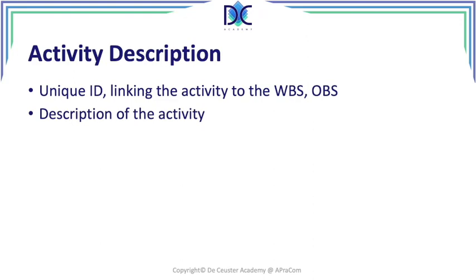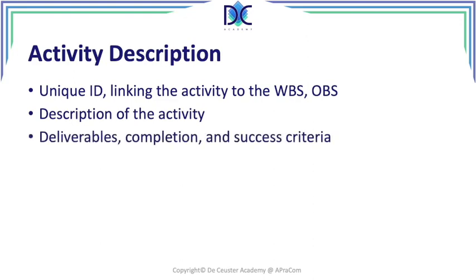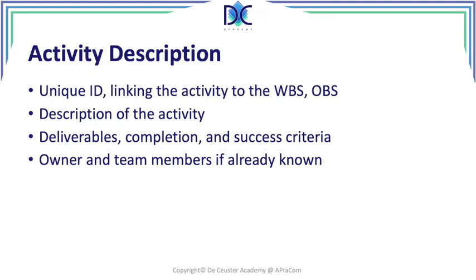There is a description of the activity. We identify the deliverables. Completion and success criteria are very important — we have to know when an activity is completed and when it is successfully completed. We can add the owner and the team member if already known, or specify what type of person is needed, including any specific certifications required to work on the activity. We can also identify the duration and the cost.